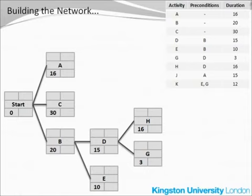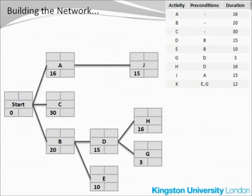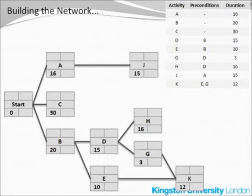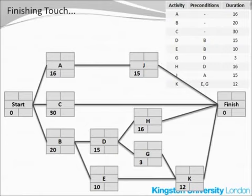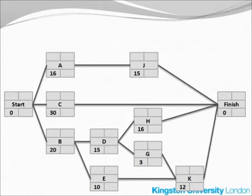Next in the line is activity J, which follows after A. Finally, activity K is a little bit more complex because it has two preconditions — activity E and activity G. We are almost finished, but we cannot leave any of the nodes without an outgoing line. So what we need now is a finishing node, which should follow every activity that is not connected yet. This is the activity network with all the activities in it, ready to start the calculations.